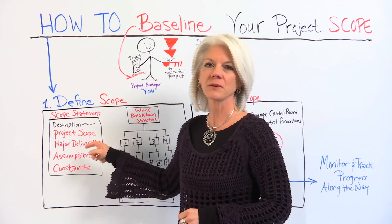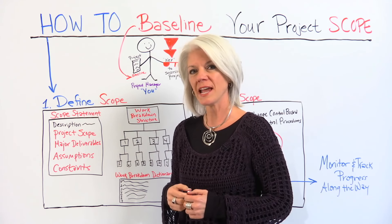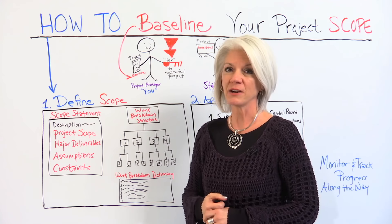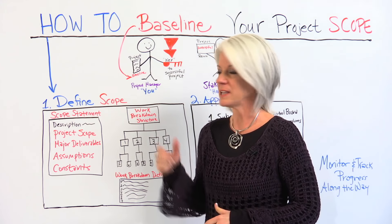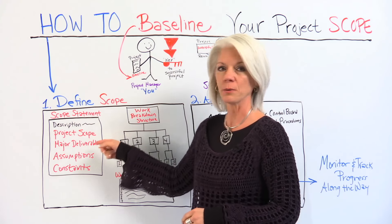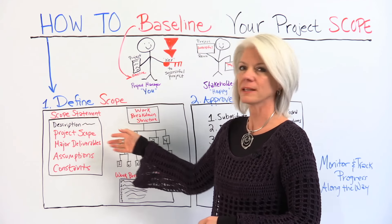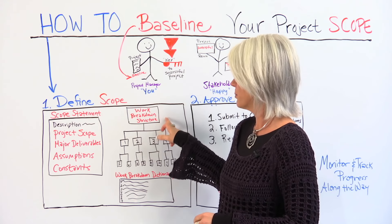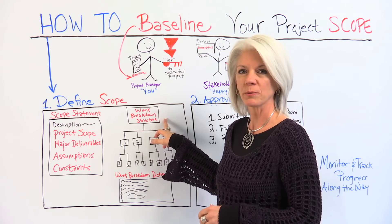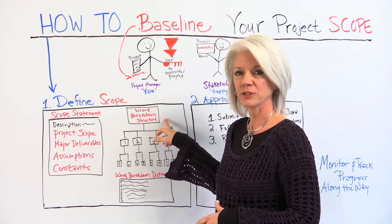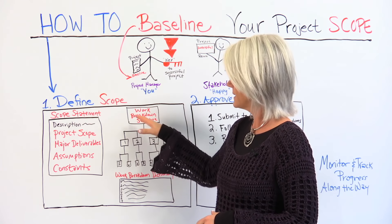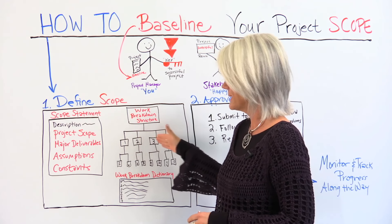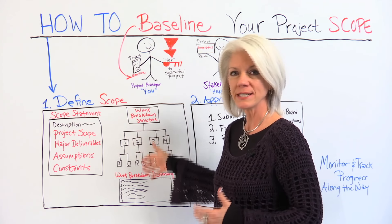The scope statement also includes assumptions and constraints of the project that may or may not impact the scope. We take the scope statement along with the work breakdown structure, because the work breakdown structure takes the work at a high level and continues to break it down into further detail.